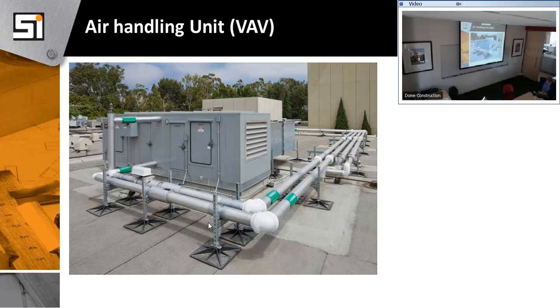You know what? That ain't written, so you're at the mercy of the building. Yeah, that's not written. So how are we going to know that? That's the biggest question. In the old days, a certain dollar amount or certain square footage triggered that. So now we're sitting in front of the customer. How do we politely say we just don't know until we go down to the city, and all of a sudden they say, sorry, you need to meet Title 24? Your schedule, your cost, everything's gone.